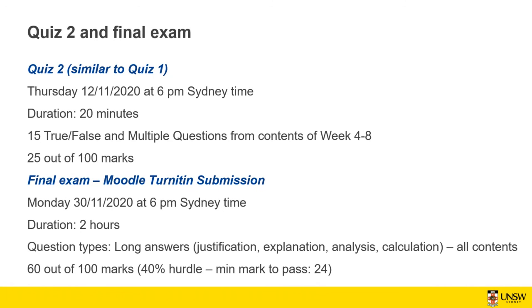So if there are two tasks, one is 1,000, one is 1,500, when they calculate ETC, okay, what's the rest of the question? You can turn on your microphone, probably that would be easier if you want. Yes, so if you have two tasks and the planned value of one is 1,000 and the other 1,500, the aggregate is going to be 2,500, and that is going to be your budget at completion.